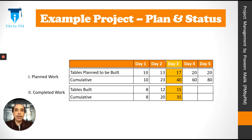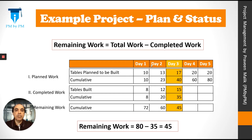Let's look at the current status. On day 3, 15 tables were built that day, and a total of 35 tables were built by the end of day 3. So clearly, we are not going as per the plan — we are behind the plan. We still have to build 45 more tables.